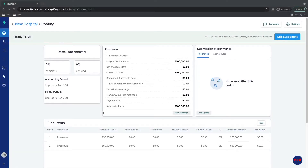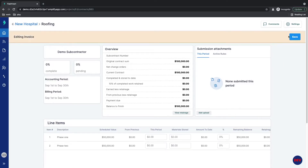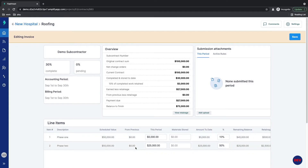Building against a schedule of values in Flashtrack takes a few easy steps. Step 1, click the Edit Invoice Items button. Then either type a dollar amount into this period — so we'll say $5,000 — or type in a progress percentage and Flashtrack will automatically back out the dollar amount into this period column.